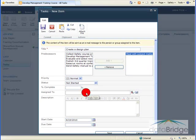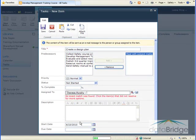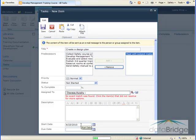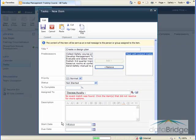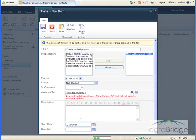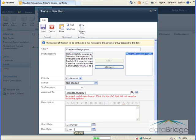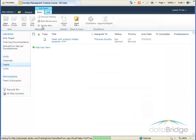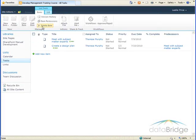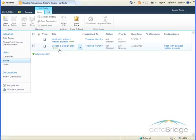Again, I'll assign this to Teresa. For the start date of this task, I will enter July 10th, since July 9th was the completion date of the previous task, meeting with subject matter experts. And then I'll enter July 23rd as the due date. And then I'll select the Save button at the top.